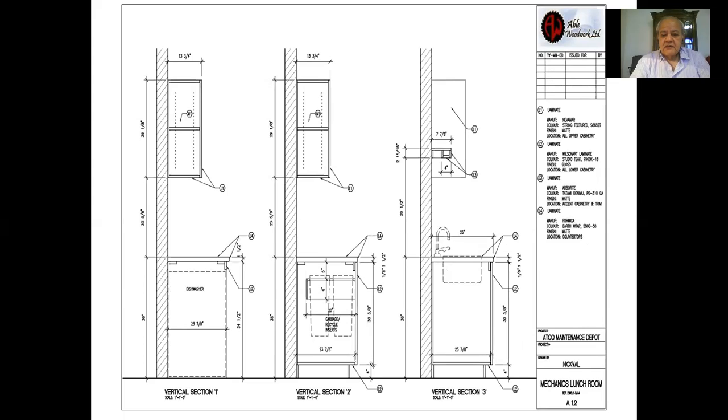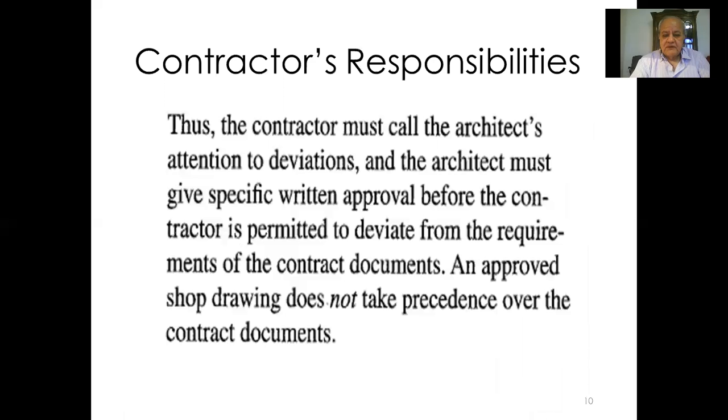It's the dimensions, location, equipment, and so forth. So you have to expect to receive these kinds of drawings from the contractor, and they all come officially with a cover letter, with a date, so that you have to approve it within a reasonable time limit.